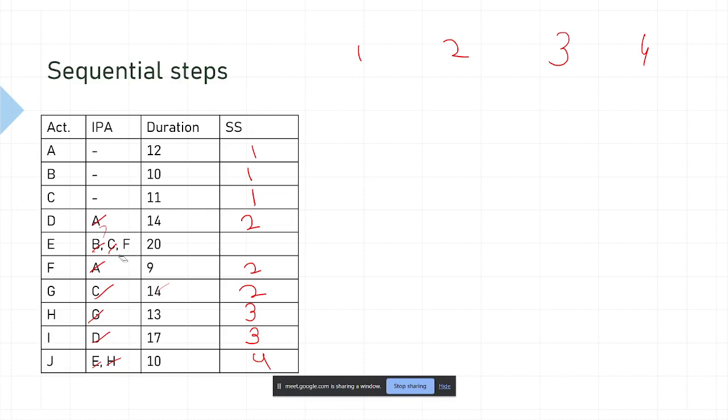But as soon as we cut F, we can write a number here. So that's why it will be 3. It would be the highest after the IPAs. Every IPA should be accounted for, like we do in event numbering. The highest of the 3 will be taken, na, sir? Yes, B is having 1 and F is having 2, so the SS for E will be 3. Okay.